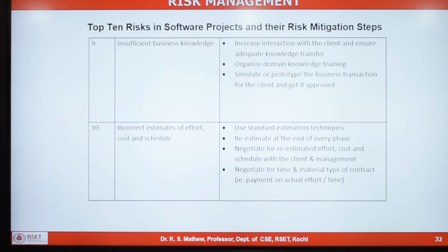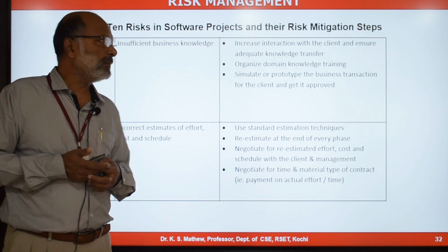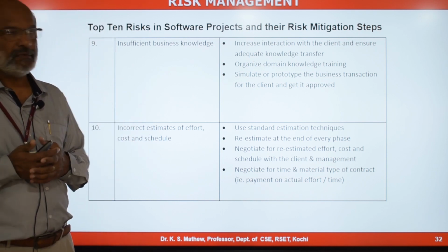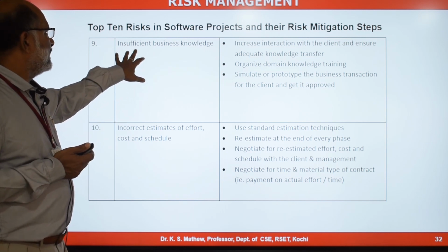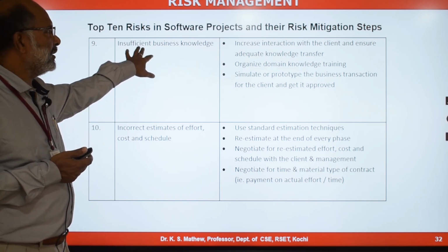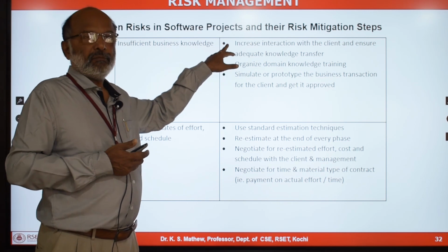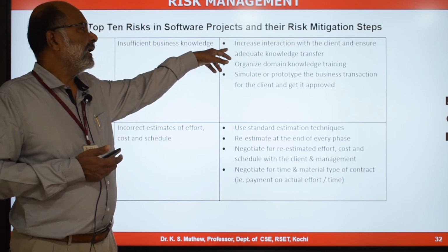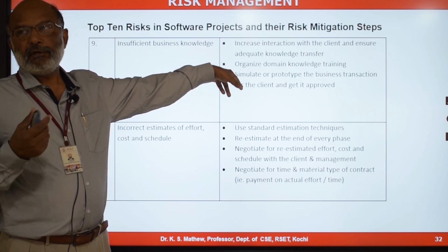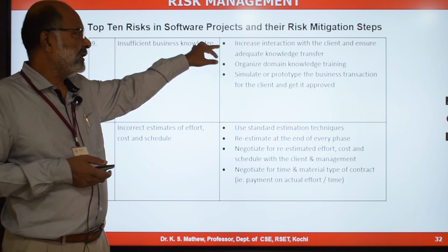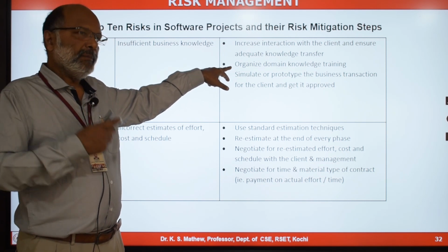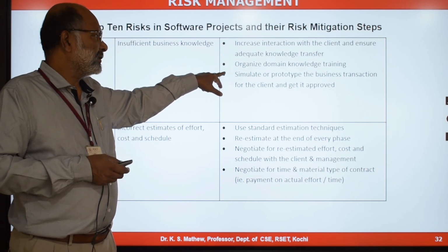Insufficient business knowledge, which is another major problem in every project. Increase the interaction with the client, ensure adequate knowledge transfer. Many team members may not have the domain knowledge. So you need to have regular interaction with the client and ensure that adequate knowledge transfer is made by the client to the team. Organize domain knowledge training conducted by the client people for the project team.